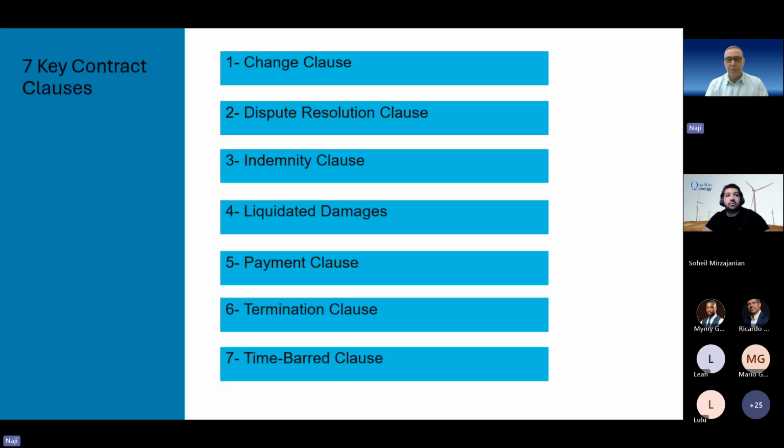There is a change. When you can apply for a change, how the change is made, how you document a change clause. It could be maybe one page within the contract explaining the steps that you have to follow to do any change. It is not done by a phone call. We need to do this, okay, it's done. It's not like this. This is the procedure. You have to describe it, whatever the description could be. It should be explicit, clear between the contractor and the client or the owner.